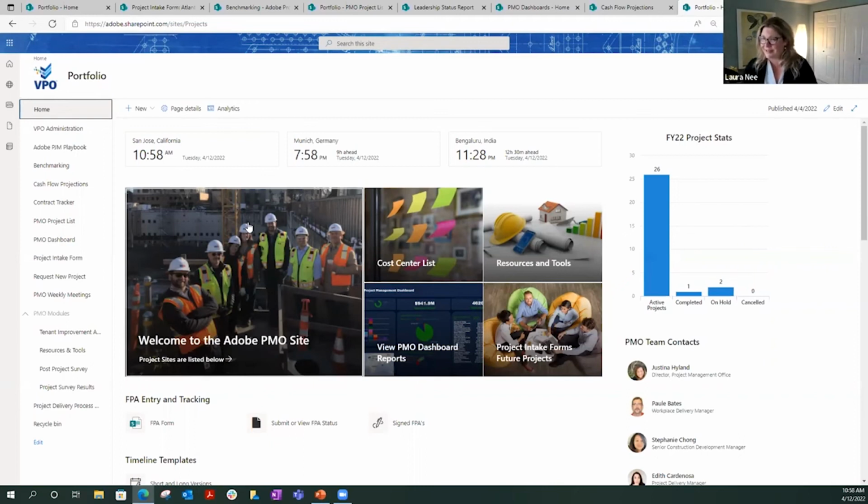And then how much data would you say is coming through? It's a nightly download of information from SAP for all the projects that are capital projects. I don't even know how to address the actual volume of data, but it's a lot. The data we're getting is when a PO is issued, if there's an invoice issued against a PO, if a PO gets changed. So anytime there's any transaction against a PO, that data is submitted, it comes through with the feed every night and then gets consumed on the project level in VPO.